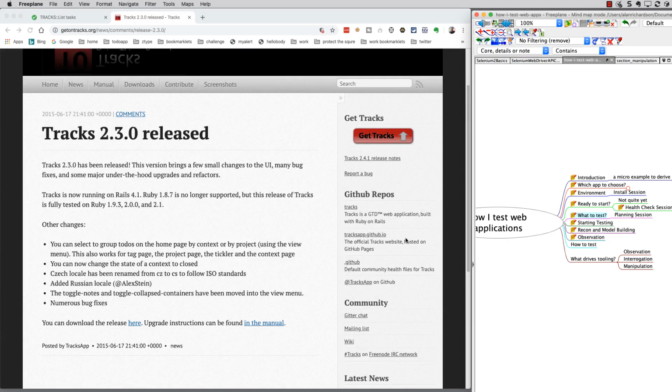So one of the things I have to do is decide what on earth I'm going to test. And we have to do this all the time as we go through a project. So very often we'll have requirements. They're often driven by stories on an agile project or what the person wants to achieve. And we might look at, when we've got a story, how this thing has been implemented, in order to understand if there's any technical risk or functional descriptions, or take into account the unit testing that's been there. Very often when we're working on agile, and this is really important, we have to look at the decisions and constraints that are made during development, because sometimes stories span multiple sprints. So we're constrained by the fact that the full story is not there.